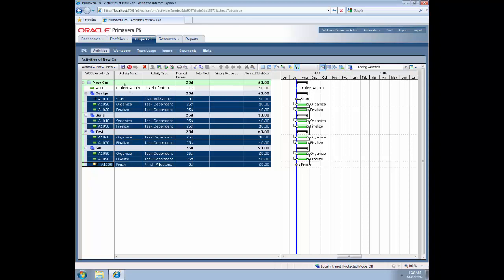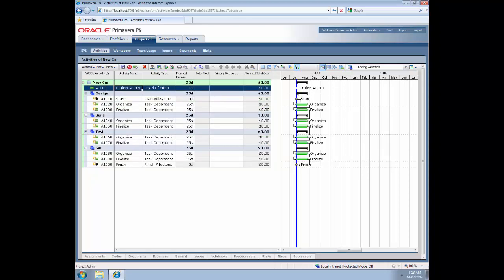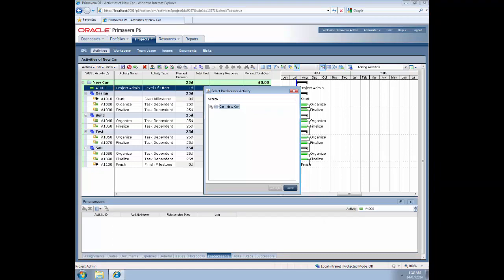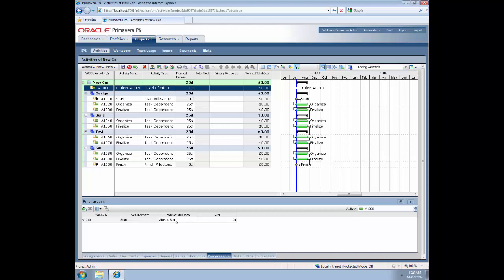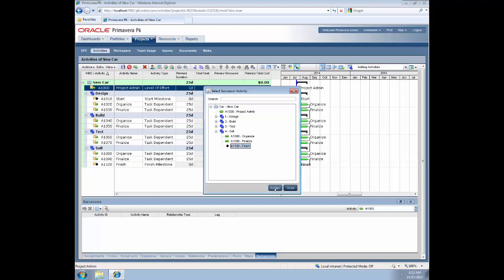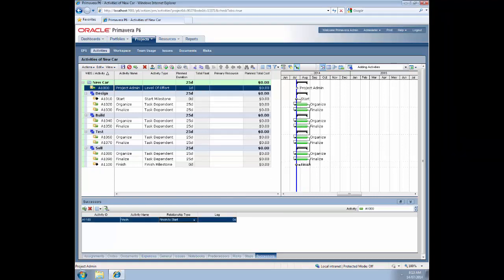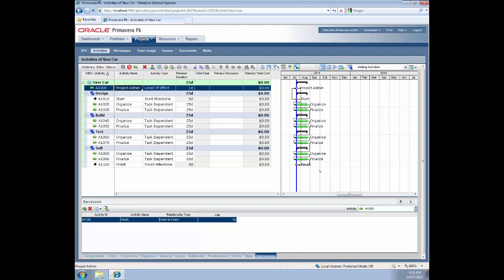Now I just need to sort out the level of effort activity - that has to be linked to the start milestone and the finish milestone. I highlight the activity, make the start milestone its predecessor in a start-to-start relationship type, which goes in automatically. Then I make the finish milestone its successor in a finish-to-finish relationship. I save that - notice the sunshine icons - and as you can see all the relationships are now in place.